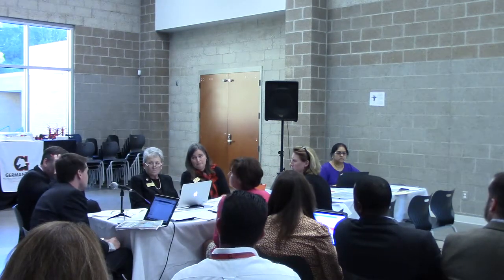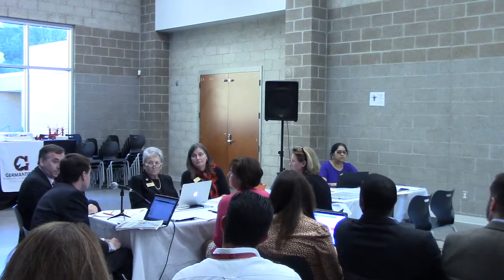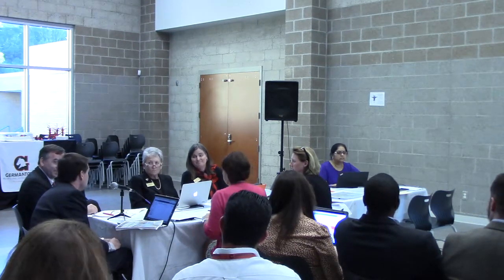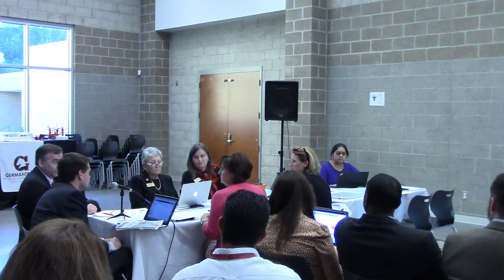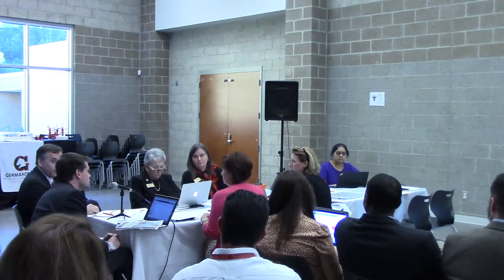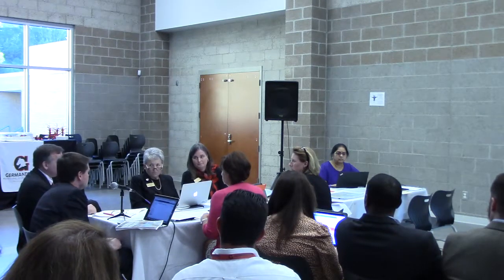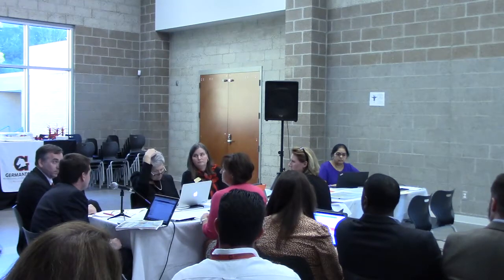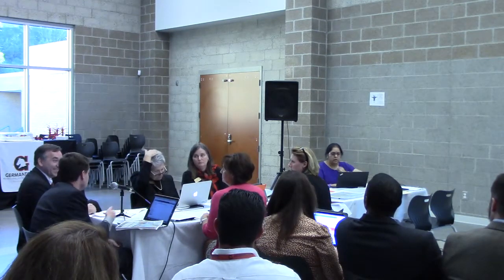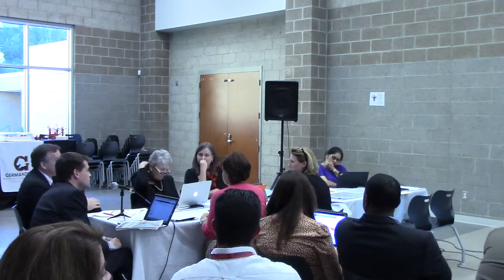Right now, everything you've seen is conceptual, pretty pictures. We have to get down into the weeds of decision making, and the committee is the right avenue through which to do that. All we've got right now is a square footage estimate on what this costs until we start making decisions like what type of flooring, what type of roof, what type of HVAC system, and the other 100 decisions you have to make. We don't know what this costs until we get through some of those decisions.